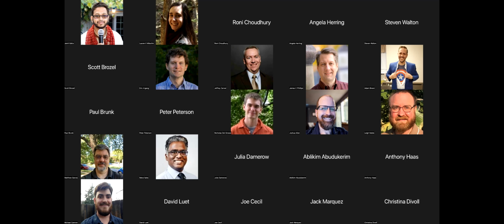Aristana has a question. How do you manage urgent needs that come up halfway through the sprint? So if urgent needs come up through the sprint, they're in two categories. They're urgent needs that are really urgent, or urgent needs that are not so urgent and somebody's telling you they are. And as a Scrum Master, you have to make the call. If it is really, really urgent, the proper procedure is to cancel the sprint and replan around the new urgent need. Now, if you're talking about an urgent need that's a couple of hours, that's very different than a big urgent need, but I'm talking about a big urgent need.